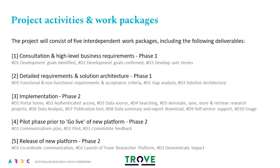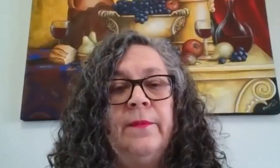The project will consist of five interdependent work packages with a set of deliverables for each. Work package one, phase one, will lead the consultation and develop the high-level business requirements. The three key deliverables are: development goals identified through the consultation process, confirmation of the development goals, and user stories developed based on the feedback received. Work package two will develop the detailed requirements and solution architecture, further developing the use cases and considering the technical infrastructure required. Deliverables include functional and non-functional requirements and acceptance criteria, a gap analysis, and the solutions architecture.